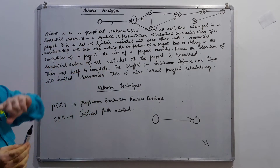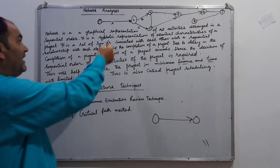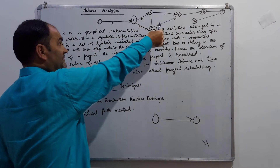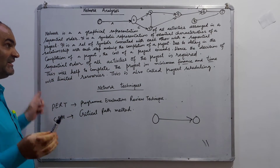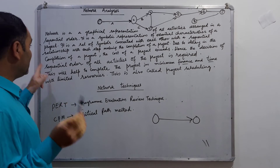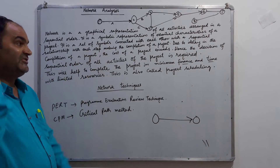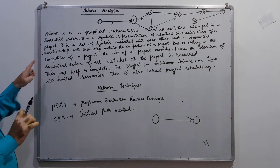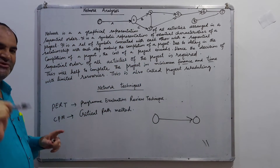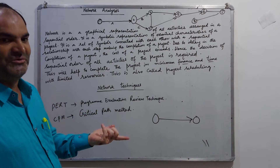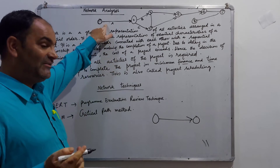A network is a set of symbols connected with each other in a systematic, sequential order, with each step making the completion of the project. Due to delay in the completion of the project, the cost of the project exceeds. If the project is delayed, the cost will exceed — so we need network analysis.